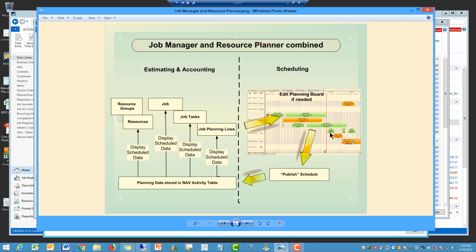I generated the job on the planning board. I made some changes to it. I deleted some hours. I went in there and I said, okay, I'm creating a new one. So it deletes the line, which will force you to regenerate. That's the one thing you've got to remember. So if you delete or change, and you can delete, by the way, if you say on a planning line, I want to delete that planning line, you can do that, and that will delete the corresponding sticker as well. But if I make a change to that line, it's going to be reflected then on the new schedule when you create it, which you should be running 2 or 3 times a day anyway.